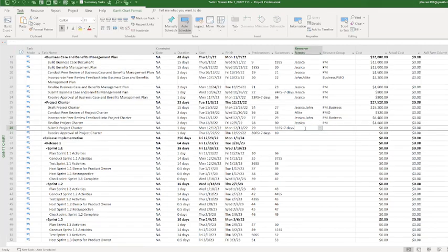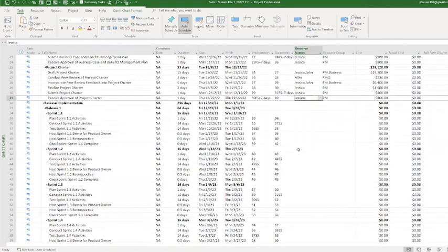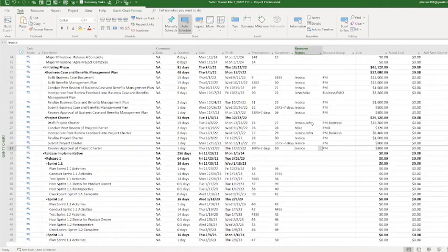It's going to tell you whether I'm over allocating or not, but we're not there, and we're probably not going to see that until we start statusing, which we might get to, we might not, just depends. It is getting late. Jessica submits. Okay. So as you see, it's calculating based on the rate that we built in for everybody. So the more resources you add, the more expensive things get, right? If you've got very expensive resources, the cost for each of these tasks they're assigned to is going to get more and more expensive.